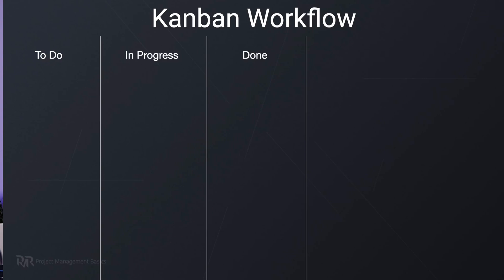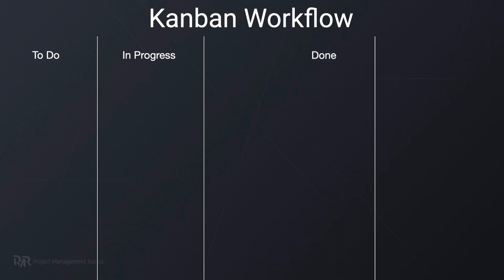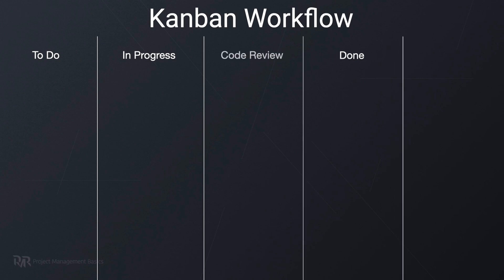At the same time, you don't want to overload the board by going too granular. The simplest board looks like: to-do, in-progress, done. But for most IT projects, it's not enough. At the very least, you want to include a code review before finishing a development task. But then what about business analysis, quality assurance, and where should UI/UX designs go?